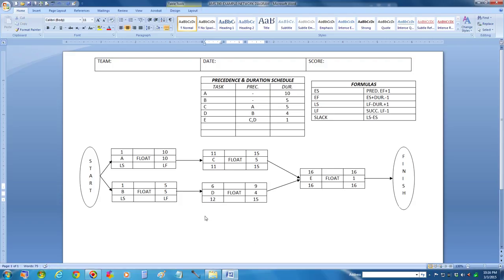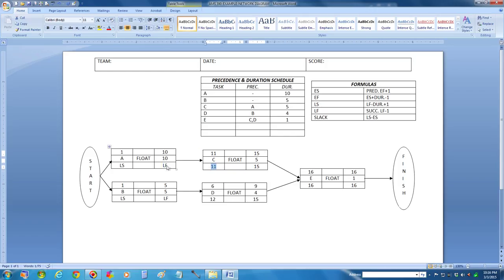Let's solve for activity A's latest finish time. I'm going to take 11 — A's successor, which is activity C — and subtract 1, so this is going to be 10. Now I'm going to solve for the latest start time, which is going to be 10 minus 10, which is 0, plus 1. So my latest start time is going to be 1.